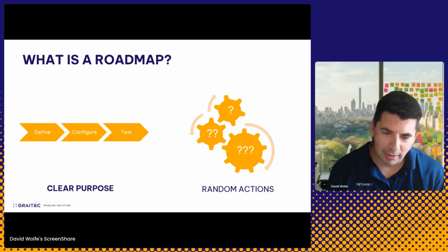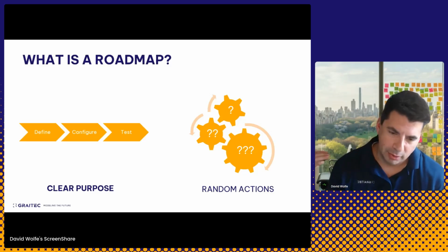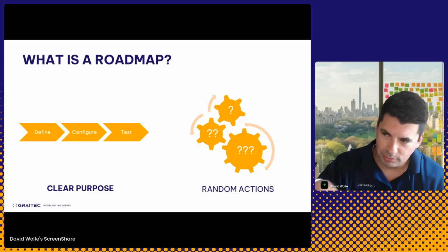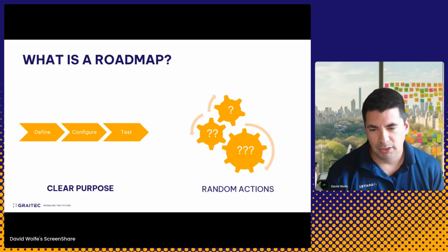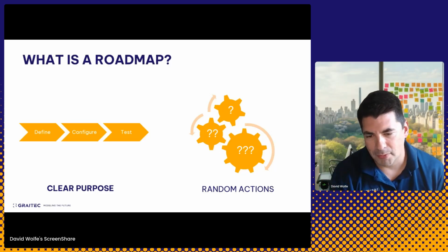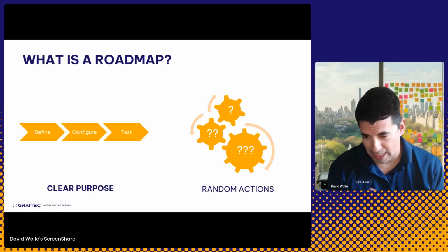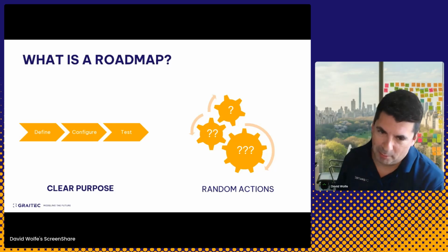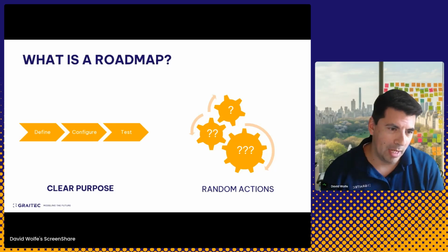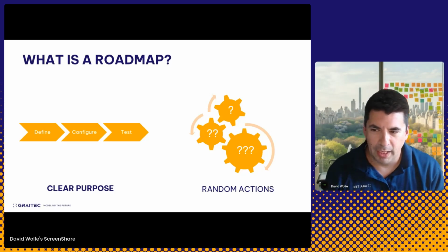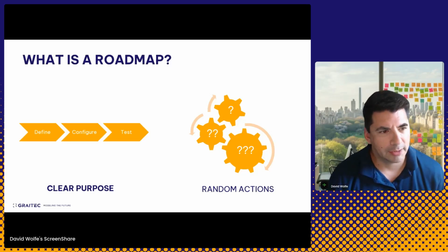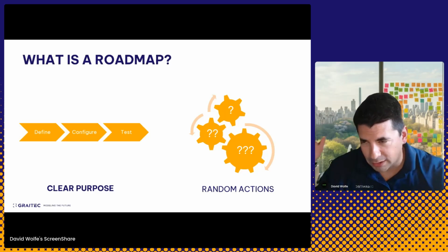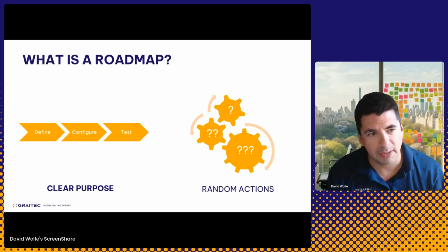And so having that as a goal means we need to build a model, build some samples, and change the ISO styles so we can use our title blocks. Those are the types of steps we would build into the roadmap so that everyone is clear on what needs to be done. We understand where the gaps are. Maybe we don't have our title block, or maybe we need to configure a style, but we don't have the client's title block. We can identify what's missing once we have the framework of steps to work against. So that's the big picture of what a roadmap is.